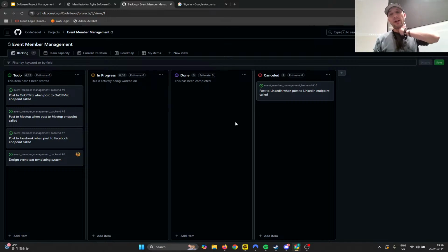And Alex was mentioning that, if you do that kind of thing, how do you handle sprint stuff? So I think there's 2 things here, and this is related to what we talked about in the lecture portion. If you're doing Kanban, then this hotfix style makes sense, because you see hotfix, everything else stops, you work on hotfix, and nothing else matters, right? But if you're doing Scrum style, it introduces a problem with your sprint commitment, right?